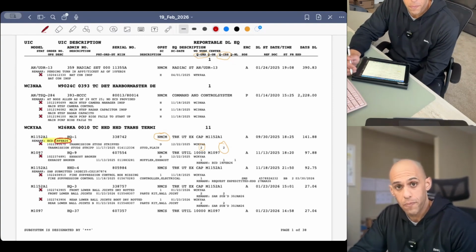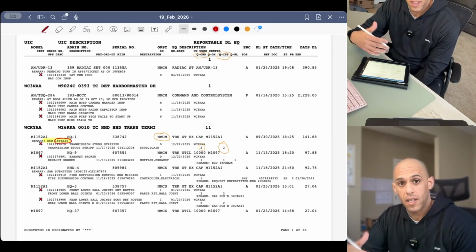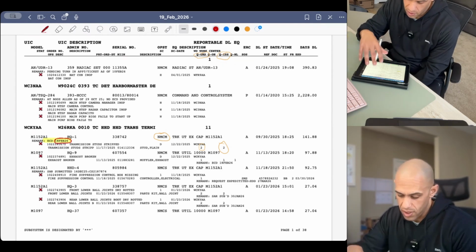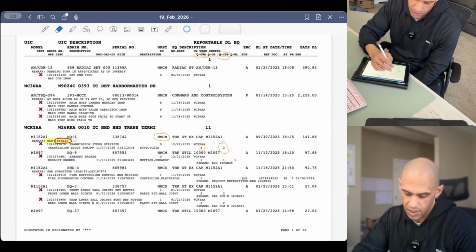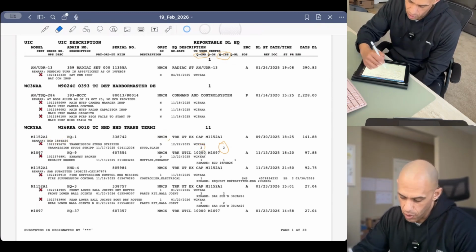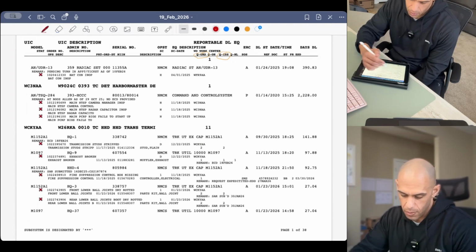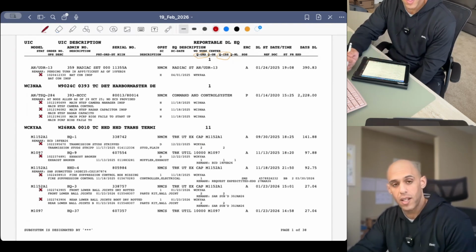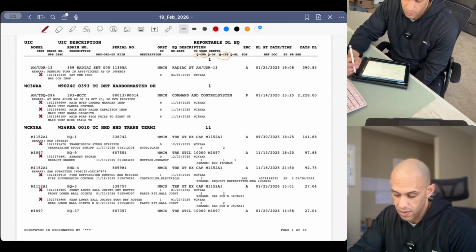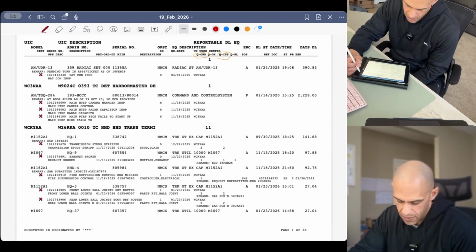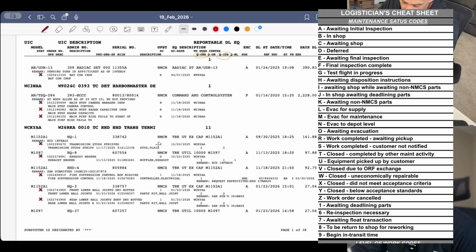It's 24 Feb. So we should be asking, as a maintenance manager, shop foreman, team chief, or someone who oversees the maintenance, what the problem is. How come we didn't get this completed on this date? And if we were not going to get it completed, did we notify the proper leadership? And why did we not adjust the date already? If it was 18 Feb and today's 24 Feb, how come that didn't get done? As you can see, they answer the question right here.